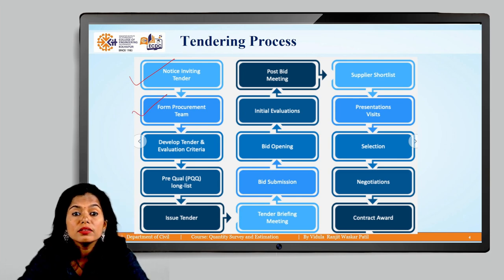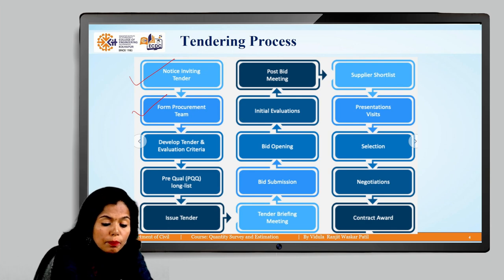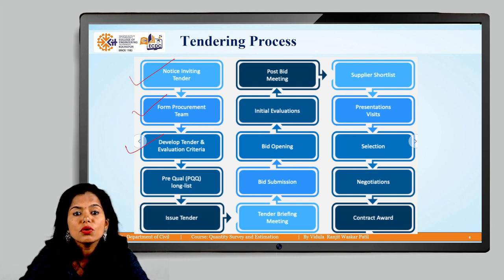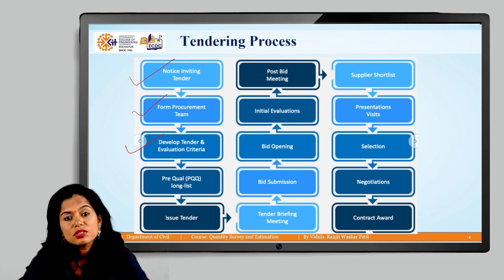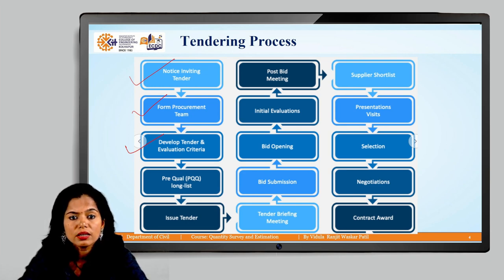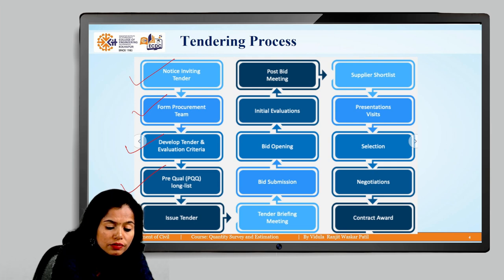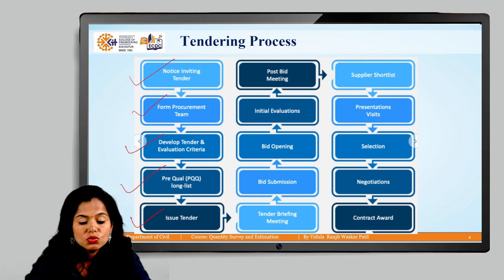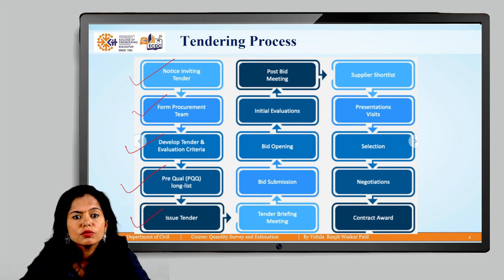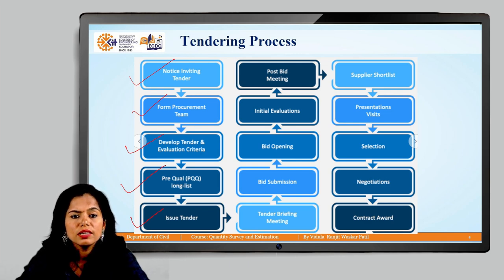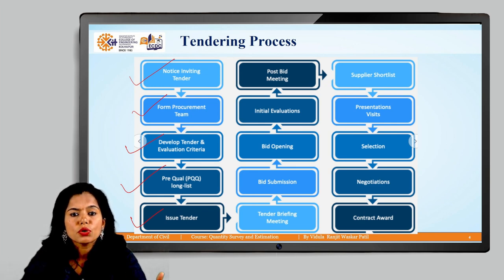The procurement team prepares and develops a tender document and evaluation criteria — how the tendering process needs to be carried out, and the list of pre-qualification requirements for the contractor. Pre-qualification criteria are decided, and after preparation of the tender document, the tender is issued to the contractors.